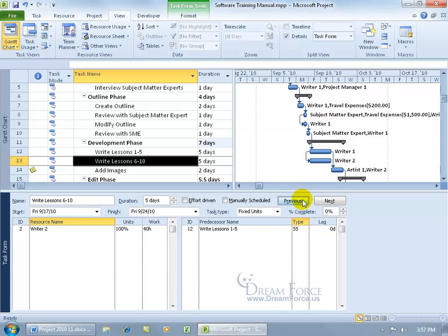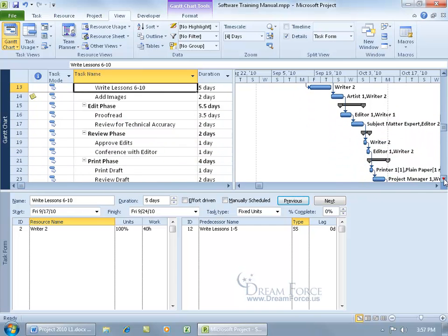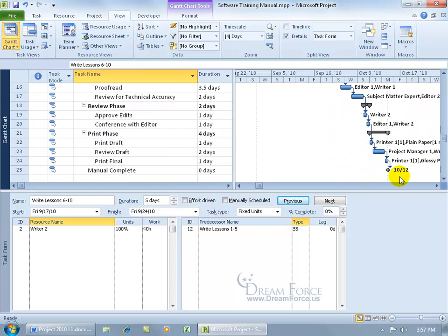Cool. So they both start at the same time, a total of 10 days to complete both tasks, as when we just had one it took 10 days. But the difference now is that, notice that as far as the duration of the project's going, instead of going out to here 10 days for one task, it's now down to 5. They're both starting at the same time, so we shortened our project's finish date from the 19th. Let me go ahead and scroll down to the 12th. Wow.